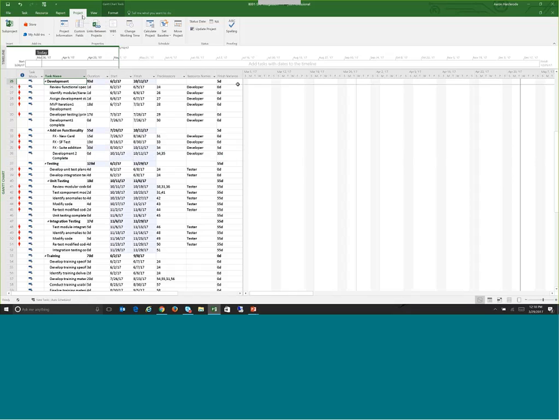Okay, so going back, quick review here. If I go back to the project, set baseline. Okay, so a good process to follow when you have scope changes or when you have new phases that you want to incorporate in the baseline is baseline the entire project to a new baseline slot, new baseline value, but then baseline just the selected areas that are impacted. Okay, and roll the details up to summary tasks and incorporate them into the original baseline.